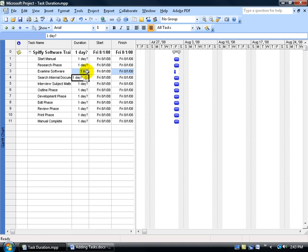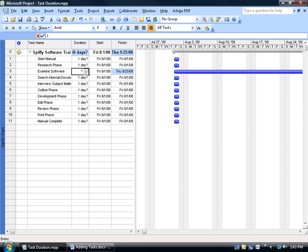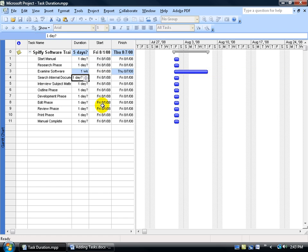Now, the difference between entering in minutes and months: with minutes, it's the letter M. With months, it's M-O. So what's your M-O? Type in two, M-O, hit enter, and there's months. For hours, just type in the number, and then the letter H. For weeks, type in the number, and then the letter W, hit enter for your week.